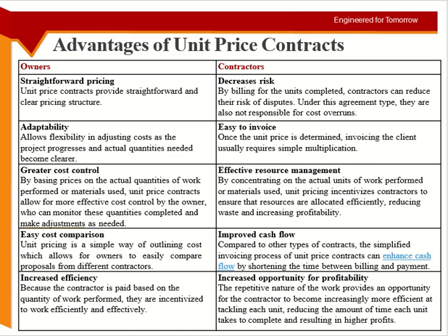The full project is 6 months. After 2 months, I will give you 20%. But in the first 2 months, maybe you worked more. Okay, so you spend more, you are getting less. Get the point? So there could be some imbalance here. In this case, you are directly getting paid for the amount of work you have done.